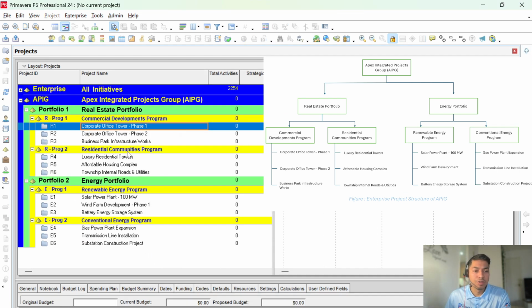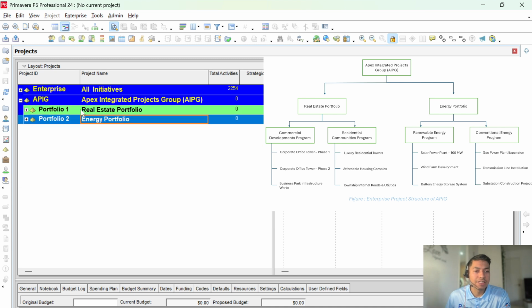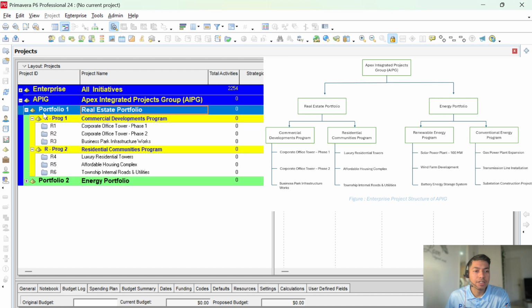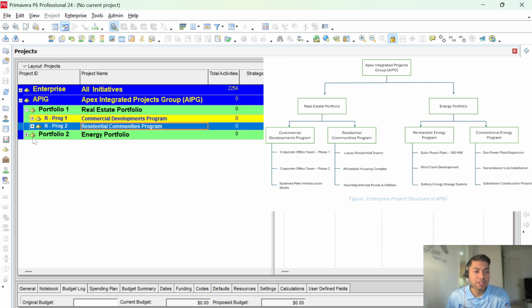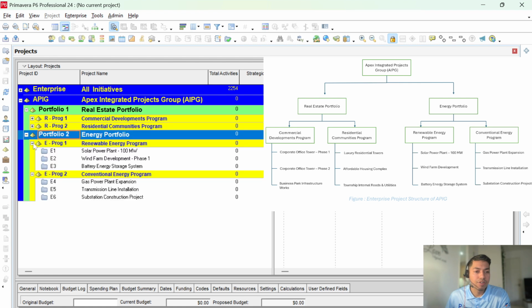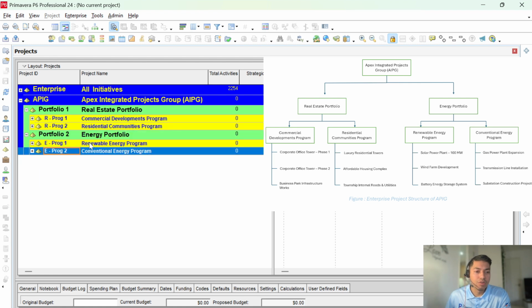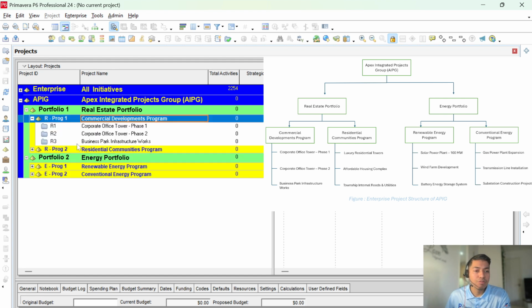We have added all of the projects that we want to cover in this video. We have created one EPS under the company name Apex Integrated Project Group. Under this, we have 2 portfolios, which are real estate portfolio and energy. And under real estate, there are 2 different programs, which are commercial development program and residential. And similar applies to energy as well. There is a renewable energy program and the conventional one. And we have added projects under each of the portfolios.